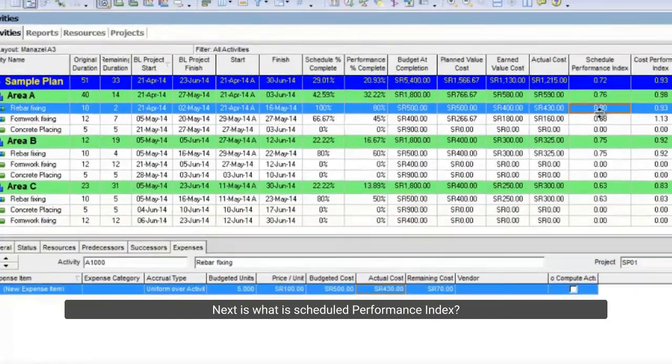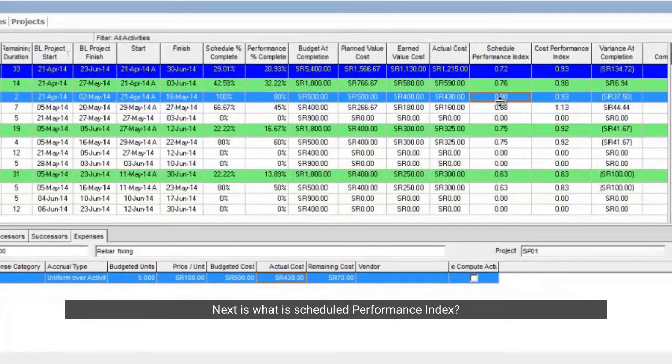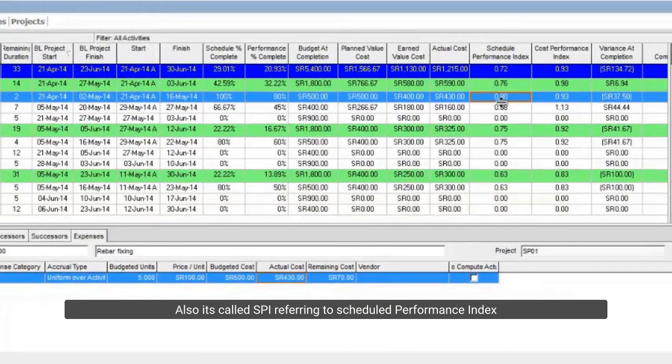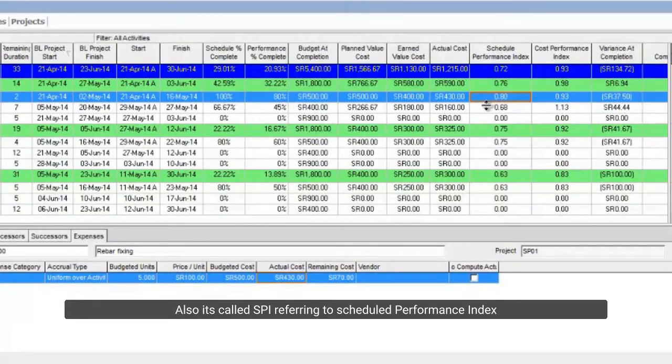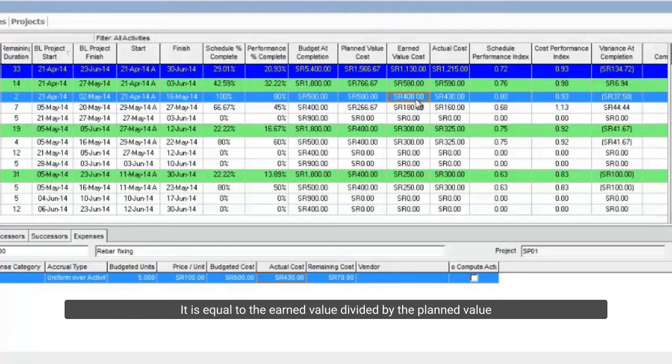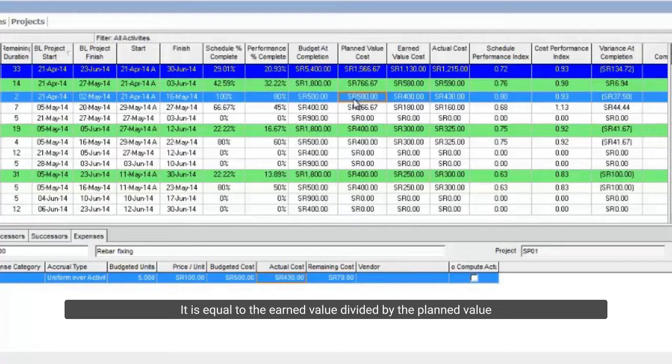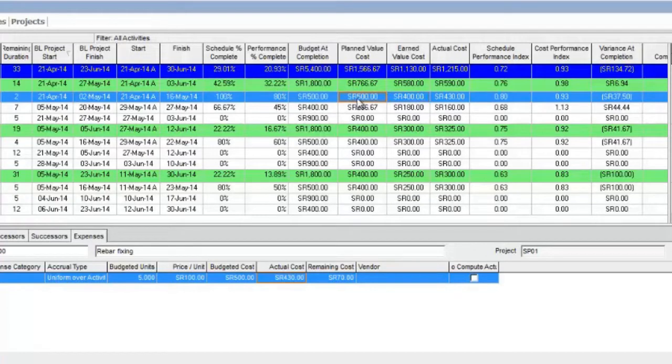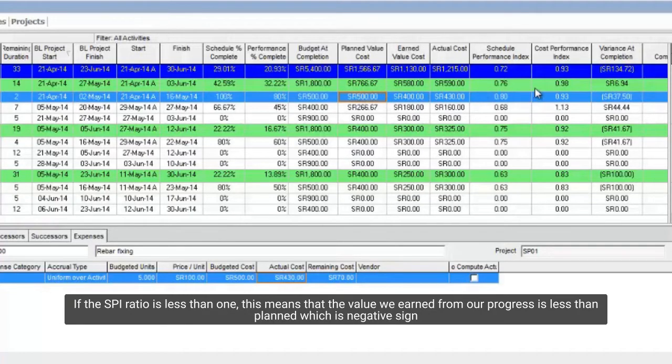Next is what is scheduled performance index? Also, it's called SPI referring to scheduled performance index. It is equal to the earned value divided by the planned value. If the SPI ratio is less than 1, this means that the value we earn from our progress is less than planned which is a negative sign.